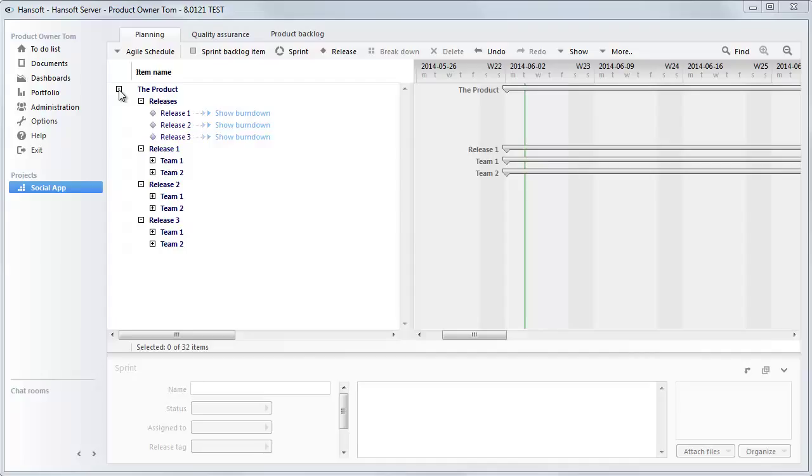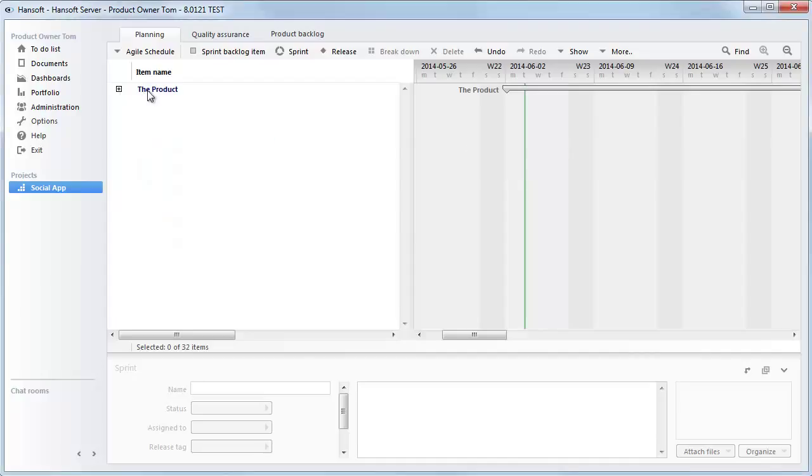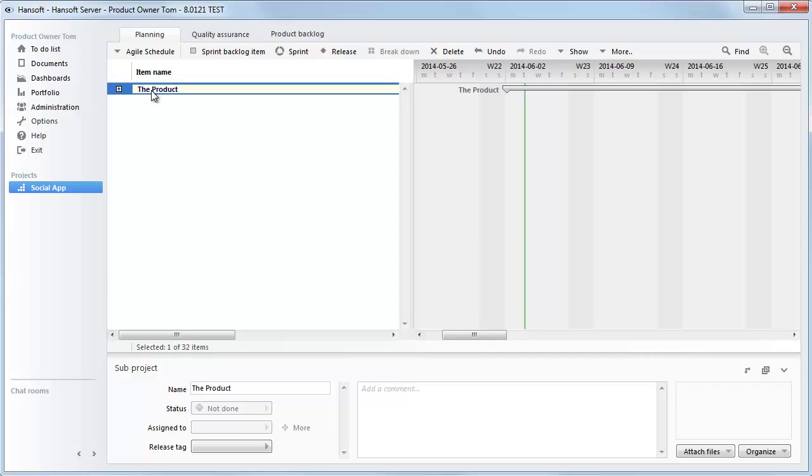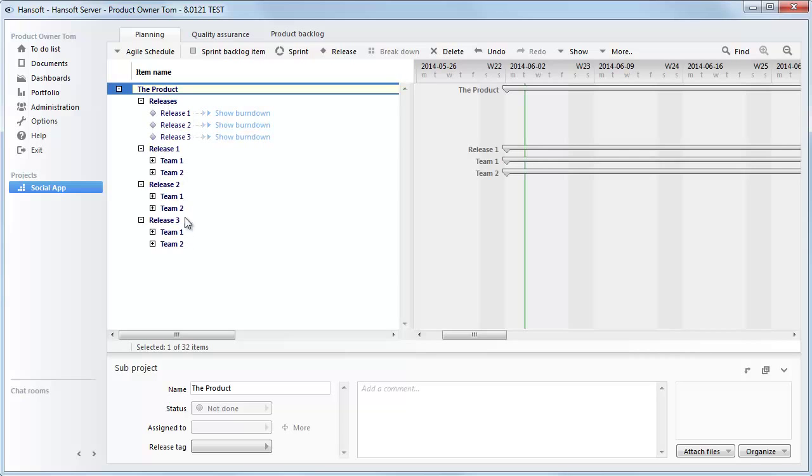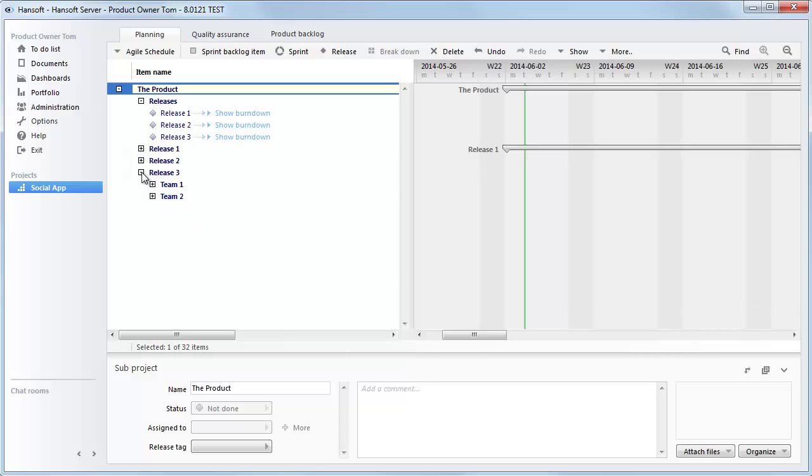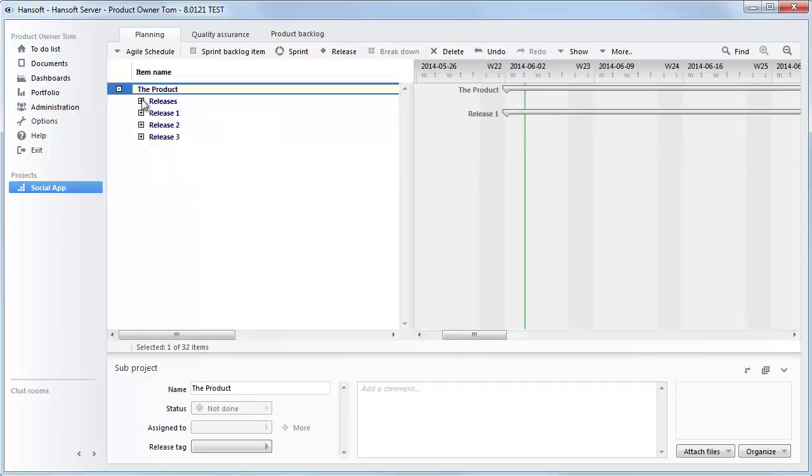If we look at this project, you can see that I've created a root node, which is a very smart thing to do because that helps to collapse. If you want to find things, having a deep hierarchy just makes it easier. I commonly see people having a long, flat list of items, which makes it very hard to scroll down through it. So build a deep hierarchy.